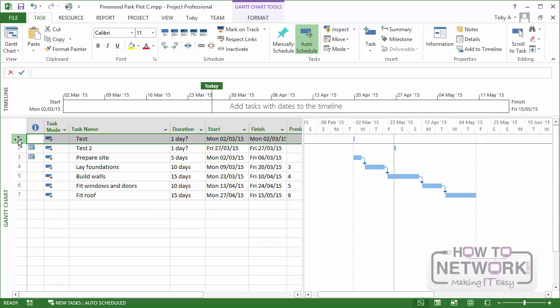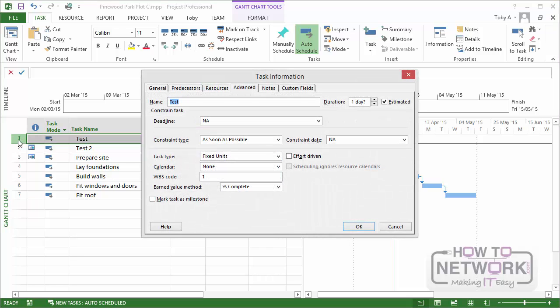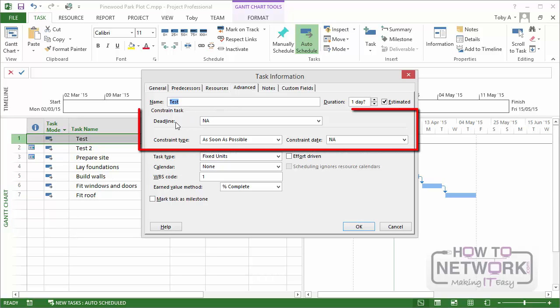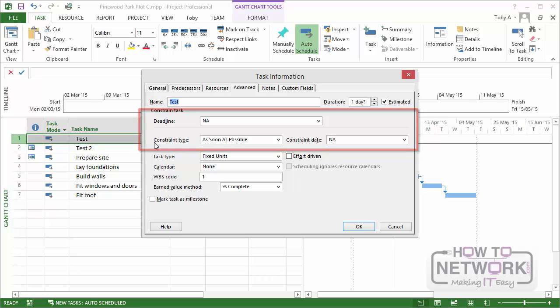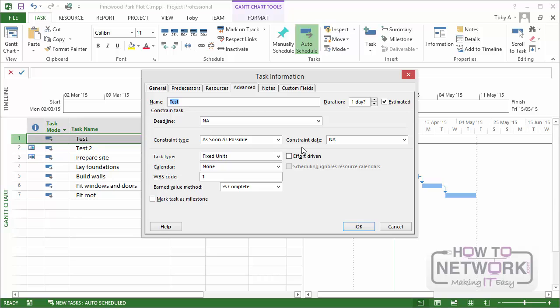Now let's go back to Test itself. Open up the Task Information dialog. And this time we're going to look at the Advanced tab. Because on the Advanced tab there are two pieces of information that we're going to concentrate on in this section. One is Deadline, we're going to come back to it a little bit later on. The other one is Constraint. And the constraint comprises one or two items. A constraint type and a constraint date. Now depending on the constraint type you may or may not need a constraint date.